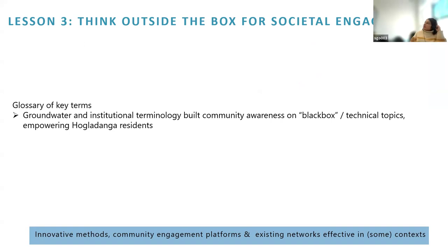And then also terminology is really important, right? If you're doing transdisciplinary research, people from different disciplines might have very different understandings of the same kind of things. And so we created a glossary of key terms that was not only used by us as researchers, but also used by the local facilitators when discussing these same concepts with the community. So key terms, especially technical terms relating to the groundwater system or institutional terminology, really helped build community awareness on what would otherwise be quite a black box, vague and abstract topic. And in this way, empowered residents in the context where it was used.